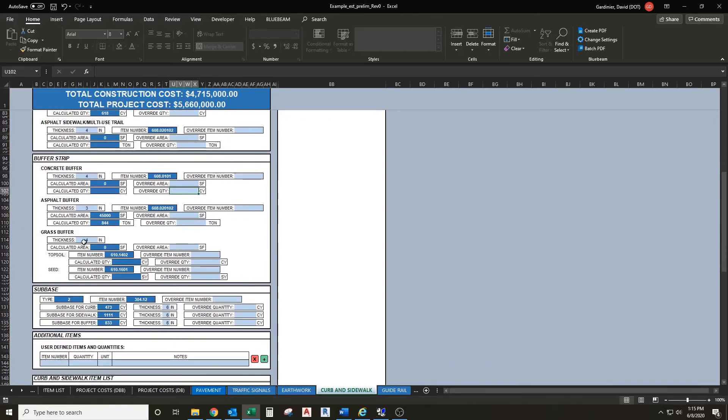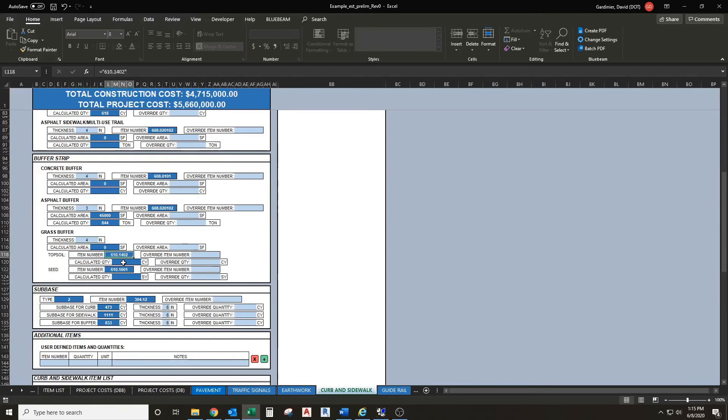There's also a segment for a grass buffer strip. By default we're using 4 inches of topsoil and it will calculate your topsoil. You have the ability to change your overall items and your seeding items and quantities. You have the ability to override this as well.